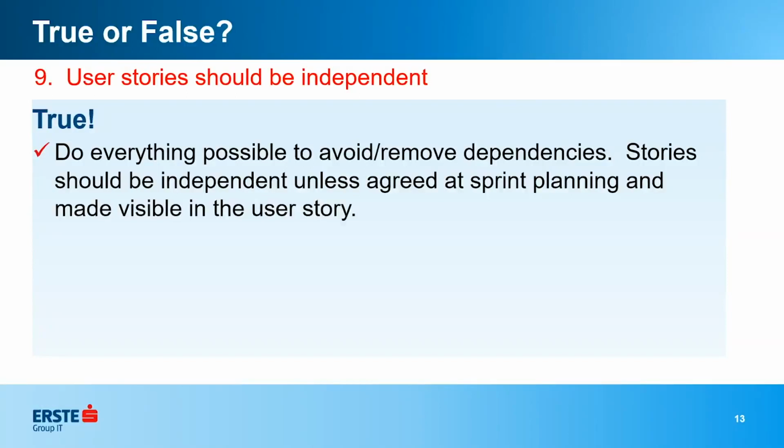But if you're not able to do that, which happens, just make sure everyone in the team that's going to be touching that story is aware of the dependency, and even write it in Jira so that nobody can miss it. Say, we know there's this dependency, we're going to finish this, and write a sentence or two of how you're going to handle that dependency.